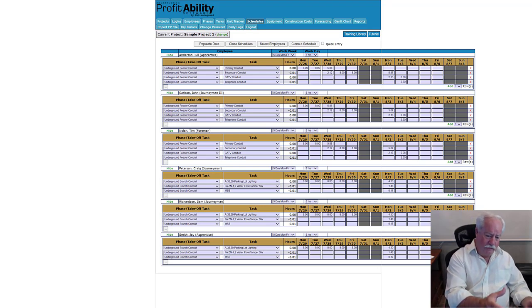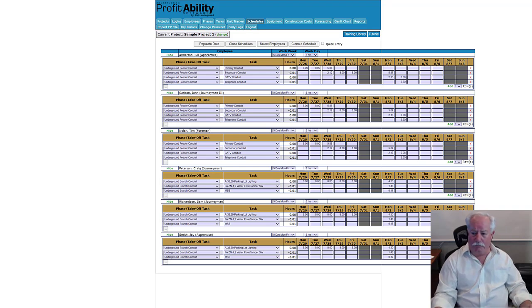So then, since they don't have sand, they got to put them somewhere else, and they don't really need them there because I already have a crew there. Or if they do need them, that crew leader, that foreman for that crew, has to train them to do what they're doing because they haven't done it before. And it takes him several days just to get them trained, and by the time he gets them trained, then they take them away. You see what I'm getting at? It's total chaos.